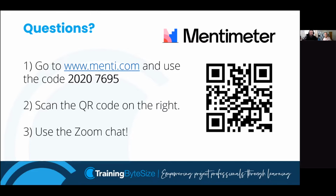No, that's a great answer. And just to follow up on that, that sounds to me like an estimating funnel, doesn't it? In BOK7 terms, there is a funnel where you start with your subjective estimate, then your analogous estimate, what planes the Americans have, then you move on to your parametric, and finally your analytical, where you've got the cost and work breakdown structure, where you can get into the real meat of it. In theoretical terms, it has that nice funnel shape that gets more accurate as you go along.